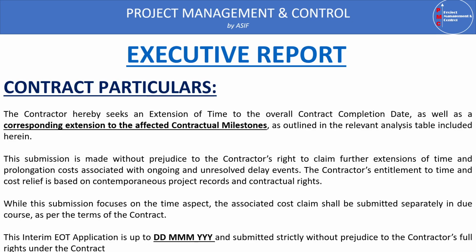The contractor's entitlement to the time and cost relief is based on contemporary project records and contractual rights. While this submission focuses on the time aspect, the associated cost claim shall be submitted separately in due course as per the terms in the contract. The interim time extension application is up to the data date. You have to mention the data date up to what time you are claiming and submit it strictly without prejudice to the contractor's full rights under the contract.